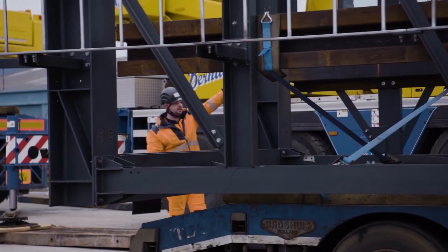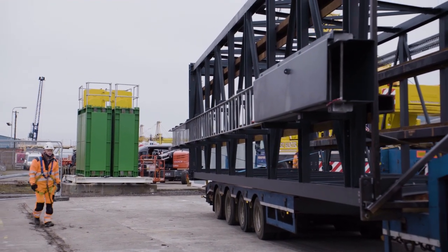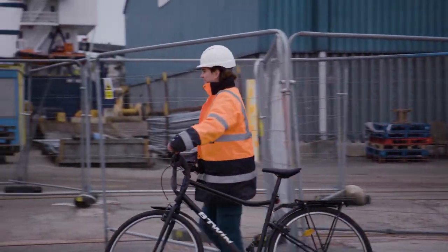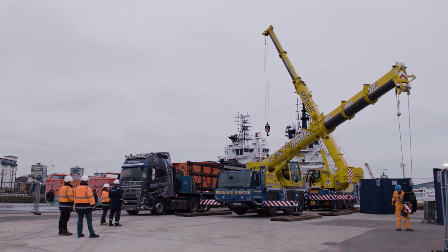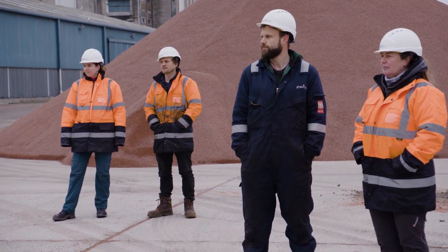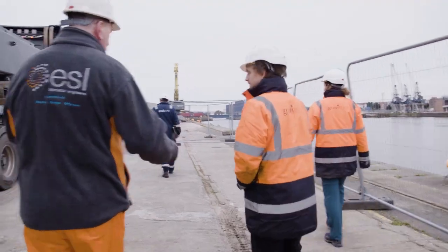There are always challenges around the civil engineering, whether that is taking an existing shaft and making it suitable. That can be a high cost activity and it can be a very low cost activity. So there are challenges around the risk of cost overrun in that. And if we're sinking new shafts, we'd be talking depths and dimensions that are relatively easily done, if you like. It's civil engineering rather than mining engineering. So we'd be talking shafts of 200, 300, 400 meters, not of a kilometer. But it's still a major engineering project.